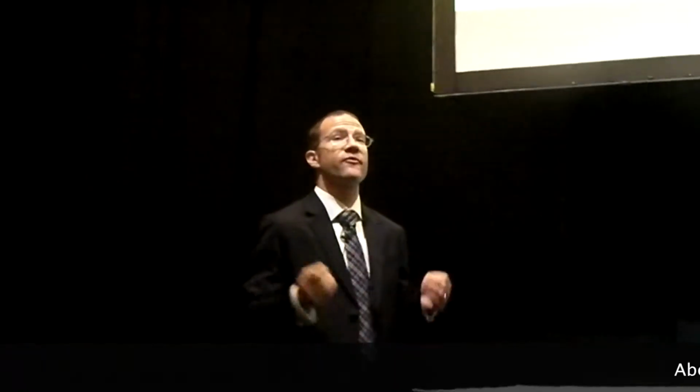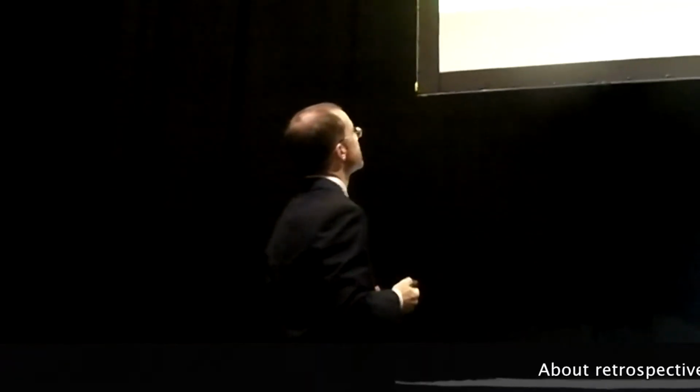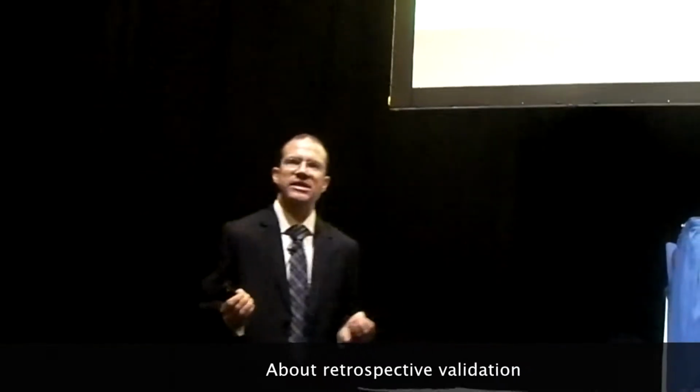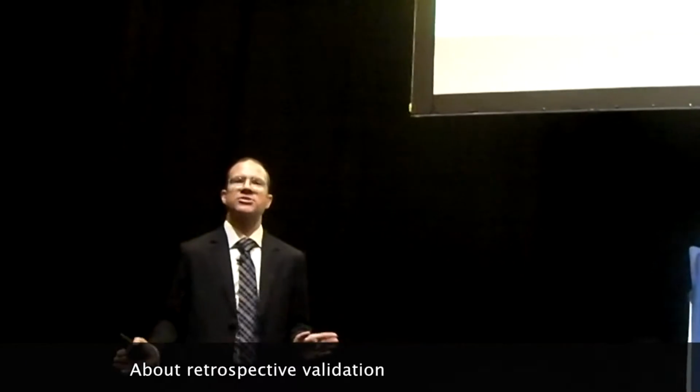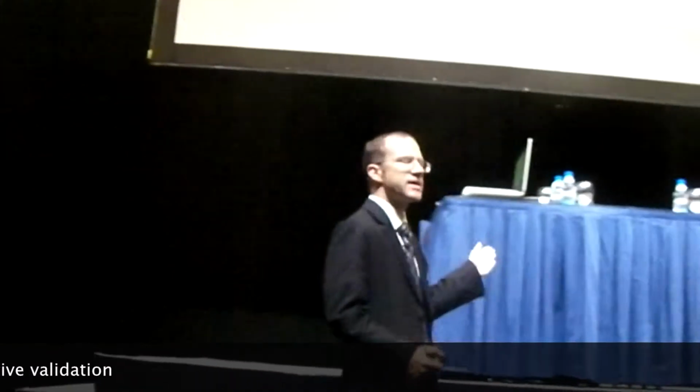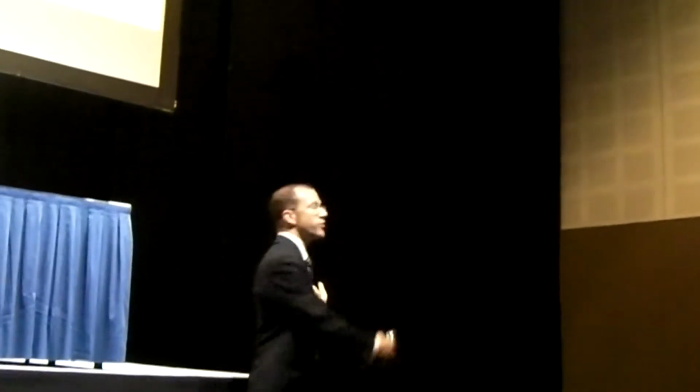The other way, which I prefer more, is the retrospective validation. What it means actually is that you do a completely normal Agile project. So you do the development, your usual testing, you roll it out, development, testing, roll it out, and at the very end of your project, you do this whole extra testing and documentation before you do your final rollout. This has one big disadvantage.